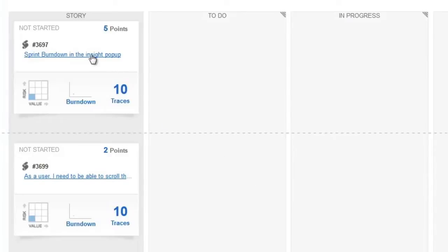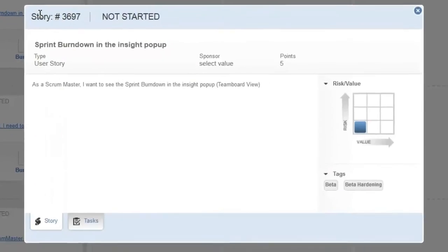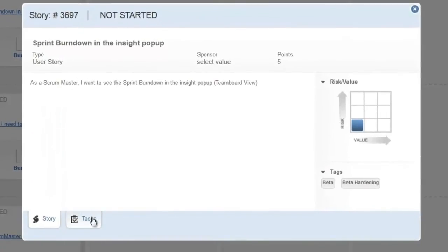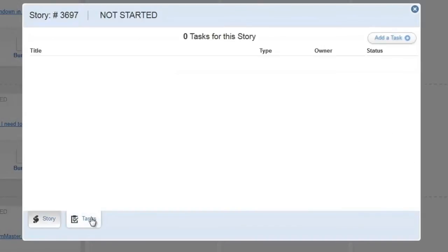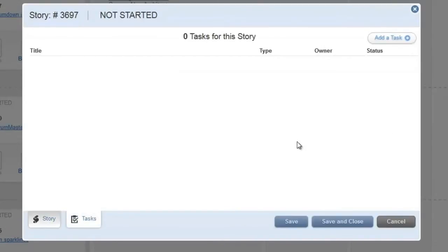To task out a story, we open the story dialog and select the task tab. Tasks should be created for all the work that must be finished in order for a story to be accepted as complete.